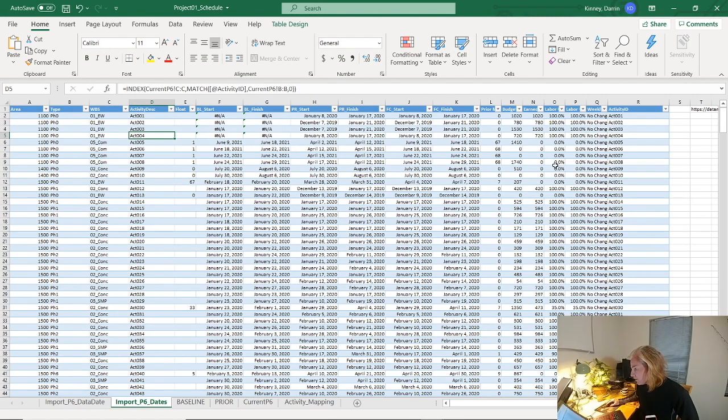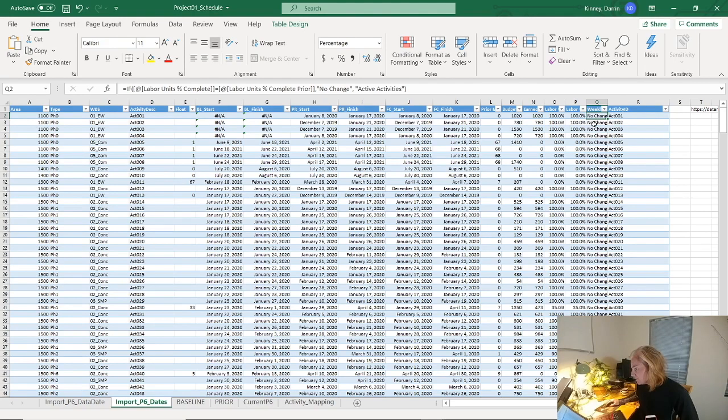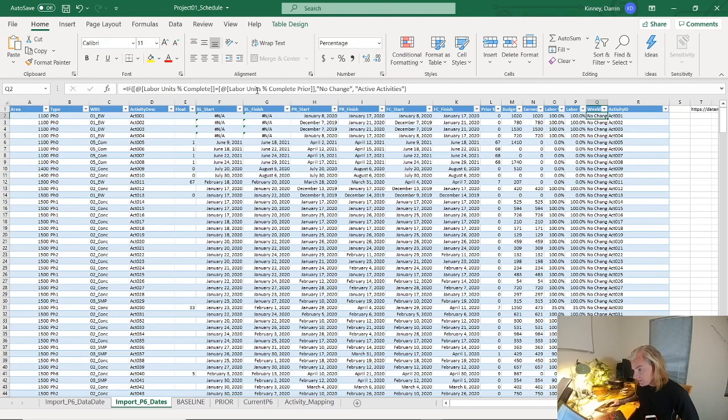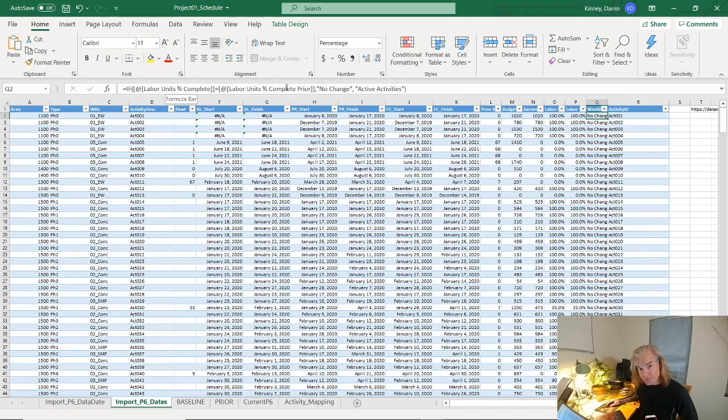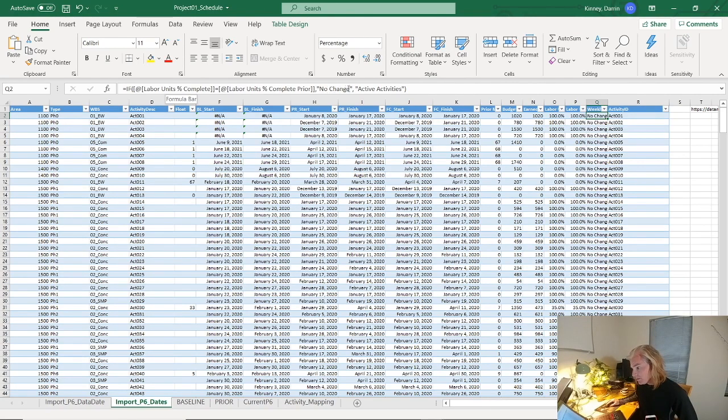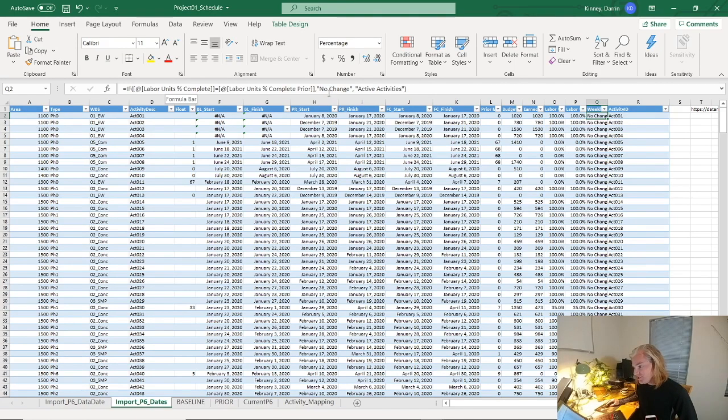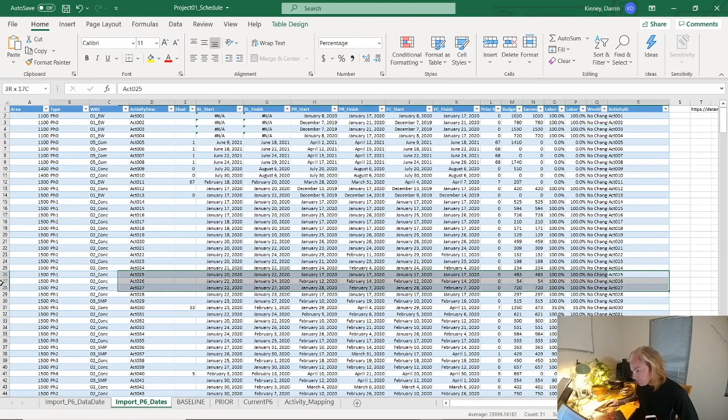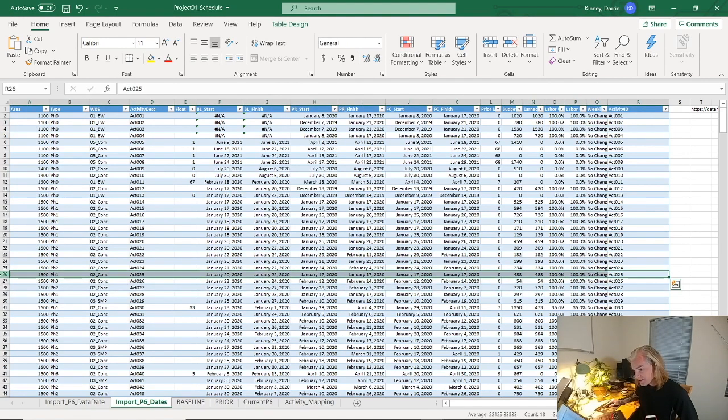One of the little tags I've done is this change in percent complete. Again, you can do this in Power BI, but sometimes it's just easier to do something in Excel. If I got a change in my percent complete, doesn't make a difference if it goes up or if it goes down - if there's just a change I'll say 'active' because that means there's a change, otherwise I say 'no change.' That just gives me a little key when I bring it into Power BI. Simple flat files, not dealing with XERs, not dealing with databases, formats good, easy.